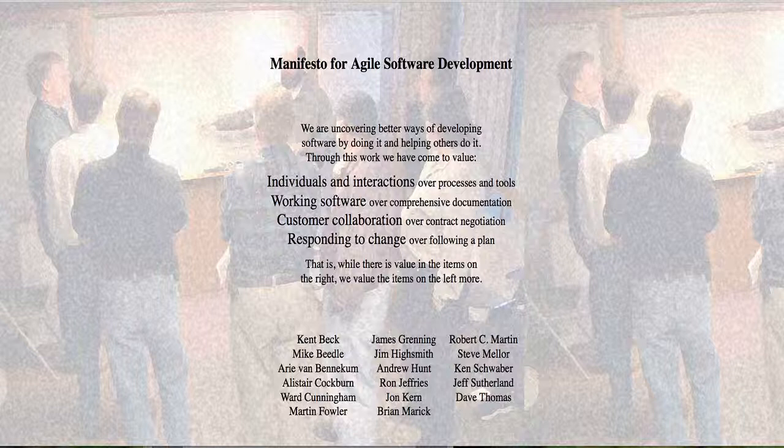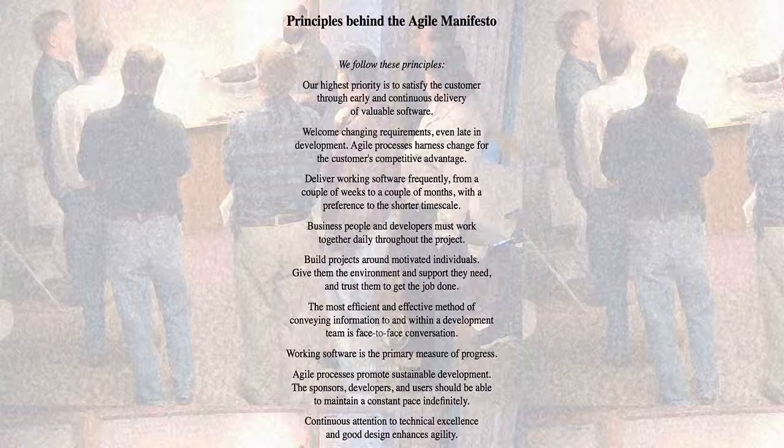Sounds political, right? Well, it was political in the sense that it gave the user more importance in the development process. The Agile Manifesto is based on 12 principles, and here are some of the highlights. Customer satisfaction is early and continuous during the delivery of useful software. They welcome changing requirements, even late in the development process. And working software is delivered frequently, in what they call sprints, so deliverables are happening very frequently. And usually designers work in small teams.